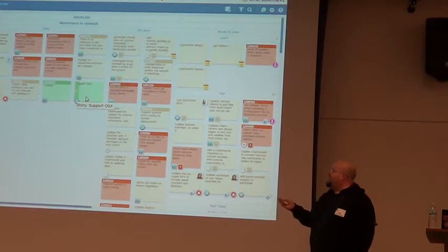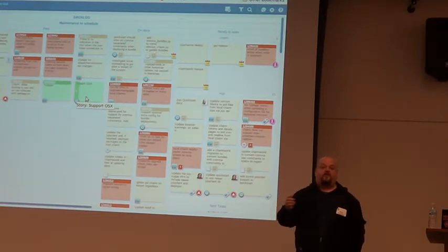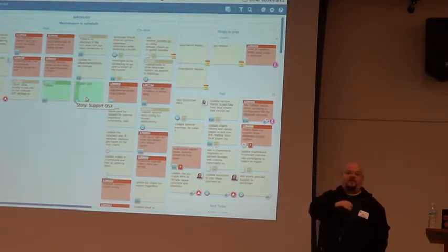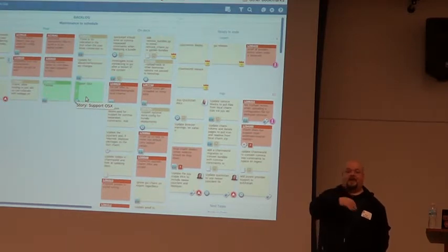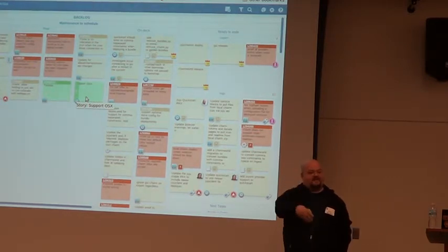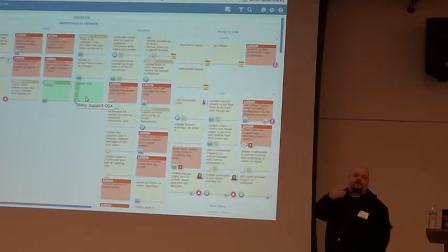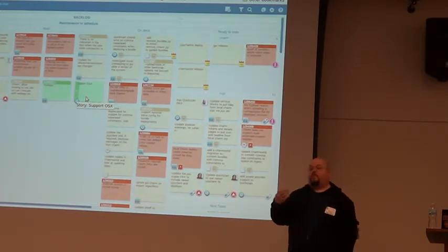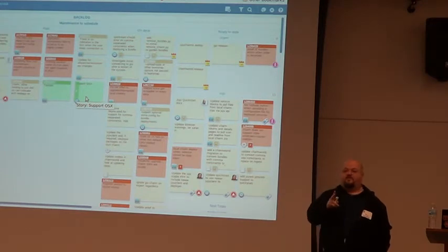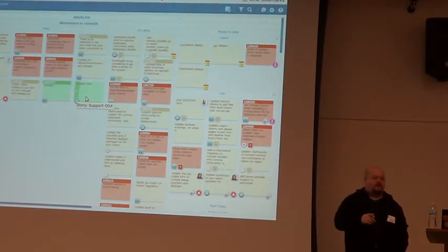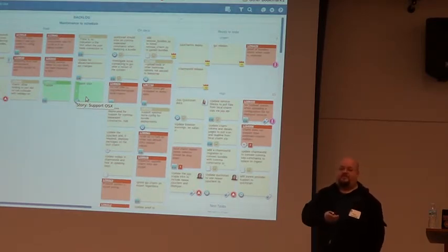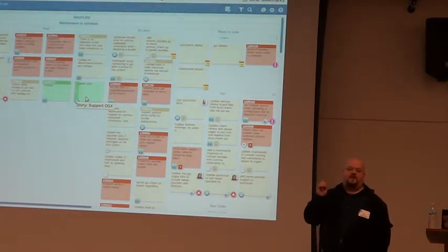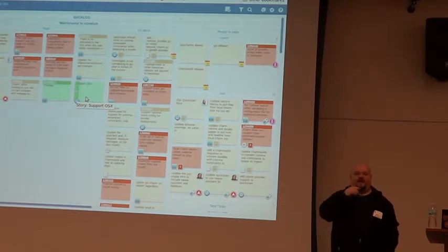We'll test it. We'll land it. Then future branches will then take that and apply it to other locations in the code base. We have firm rules, firm-ish rules. If your branch is 400 lines of code, a 400 line diff, so that's diff. You know, when you run the git diff or whatever, it's not how many lines you actually touched, but how many lines that diff is. It has to be 400 or less. You can have one review and one QA and then you can land it. If it's more than that, you have to get two reviews and at least one QA before you can land it. And if it's over 800 lines of Python or 1,000 lines of JavaScript, break it down. Too much.